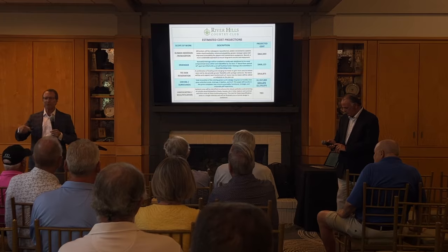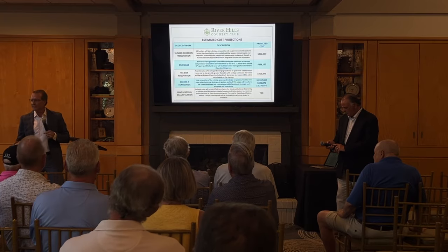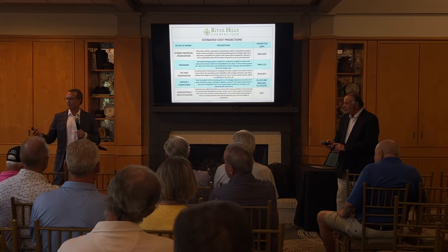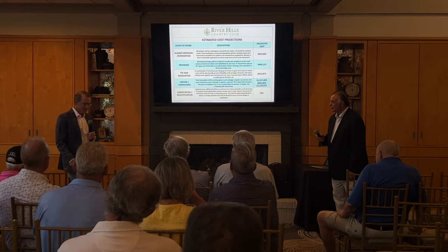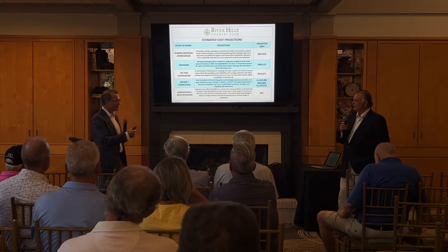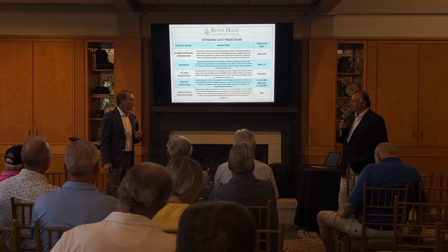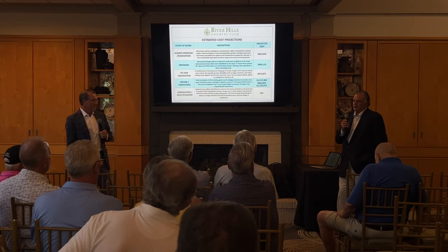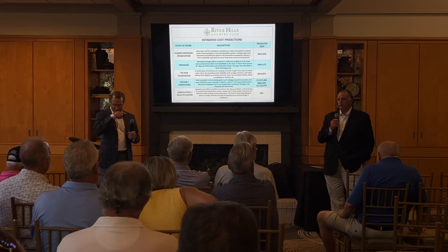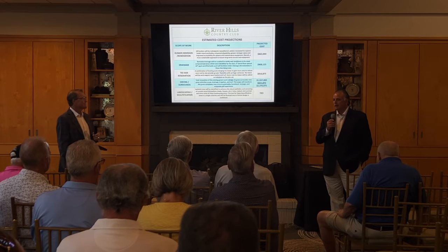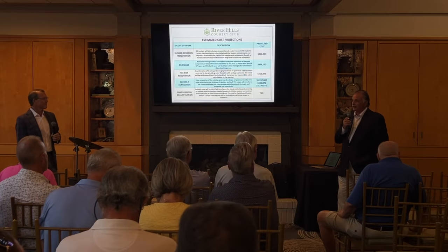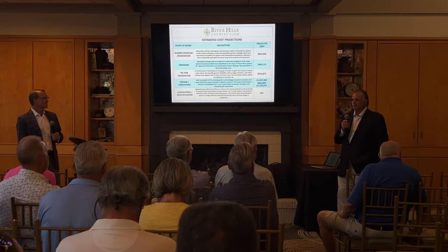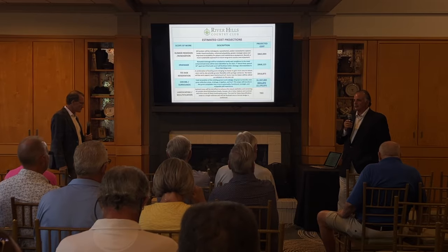Contingency is typically 10% of whatever the total number is. So if you add permitting, I don't know what the permitting cost would be, and then project management, and I'm sure there are some other items I'm not aware of that need to be budgeted for. Once we get past the vote and decide what we want to do, these are pretty close, because if we can save money on efficiencies versus doing these a la carte, I think that's where the big difference comes.